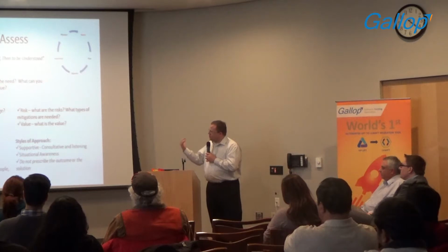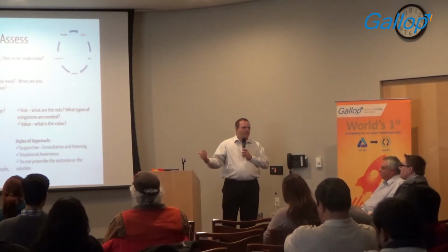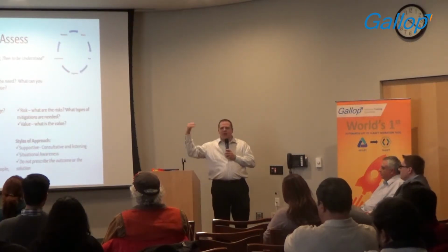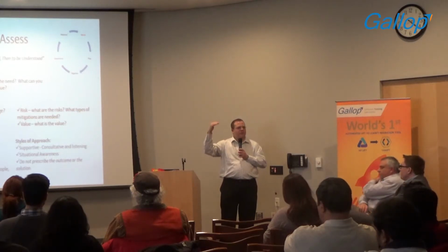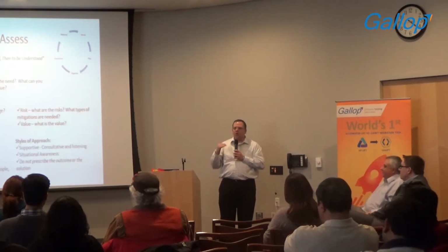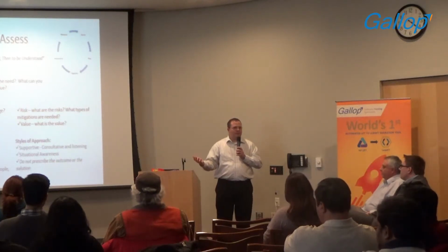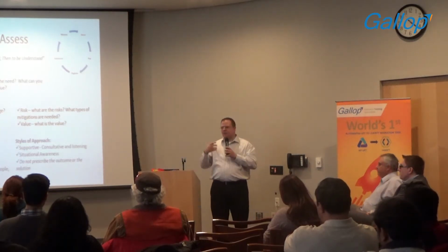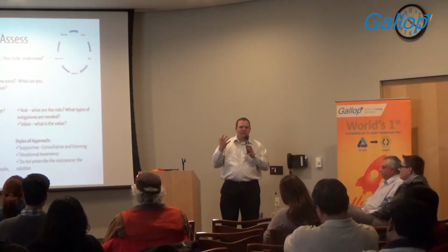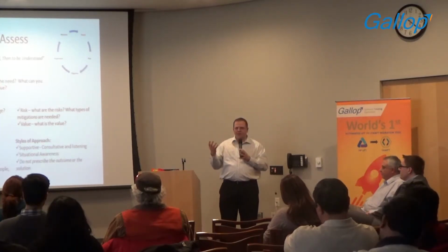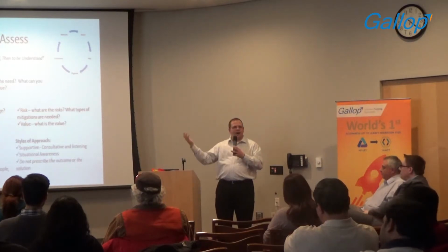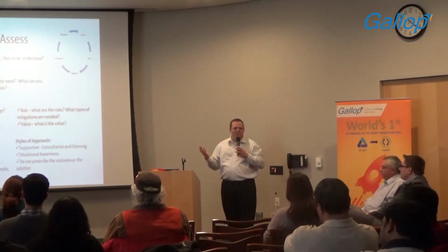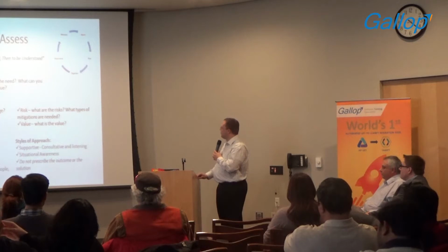So some of the methods are risk analysis. You can do a quantitative risk analysis. You can look at all of your incidents and tag them with risk and priority and business impact and dollar amount impact, and you can quantitatively say how much money this is going to cost your organization over the next 3 months. That's a simple idea, right? Or you can take everything in your backlog, if you're an agile shop, tied with business priority and with some type of impact or severity, and score it. You can take all of the high ones and put them at the top of the backlog so you know you're doing the most important stuff first. This is nothing new for folks that are doing agile or practice methodologies.